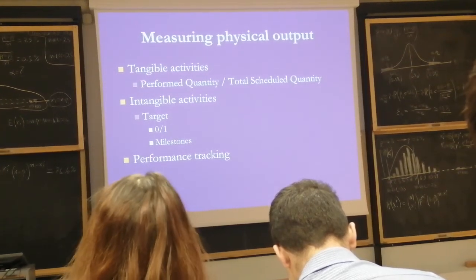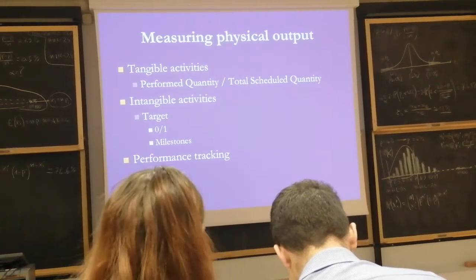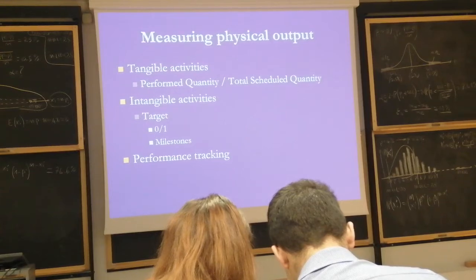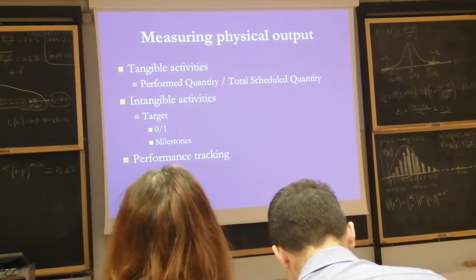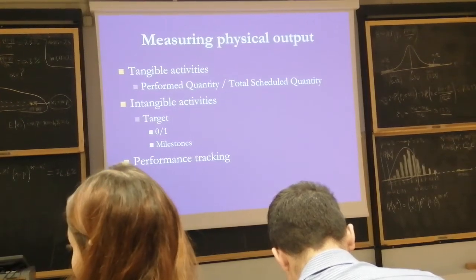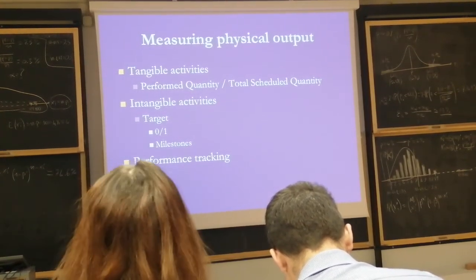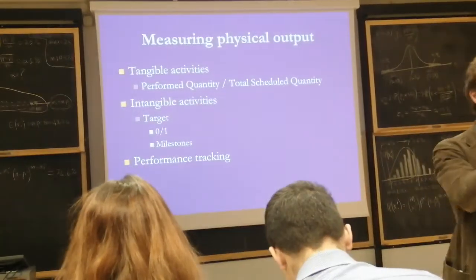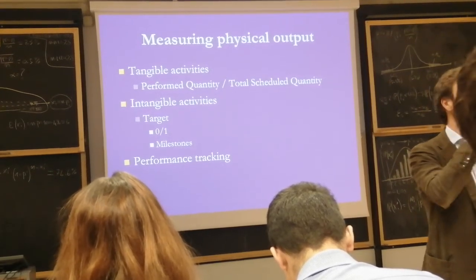There is a drawback in the 0, 1. Assume that your activity takes 3 months. Now we're at mid-November, and you are still at 0% progress in the capstone project, which is not the case because you have done 50% of your work, as you have delivered the first milestone. So we can establish milestones so that each milestone corresponds to a specific progress in the outcome.